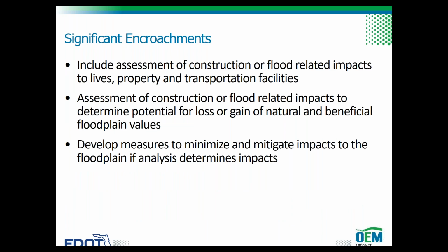The evaluation to determine the significance of each encroachment should include assessments of construction or flood-related impacts to lives, property, and transportation facilities that serve emergency vehicles or provide emergency evacuation. Additionally, the evaluation should include assessment of construction or flood-related impacts to determine the potential for loss or gain of natural and beneficial floodplain values.